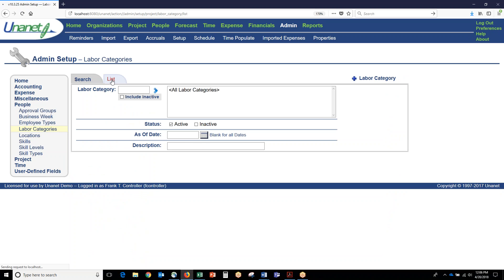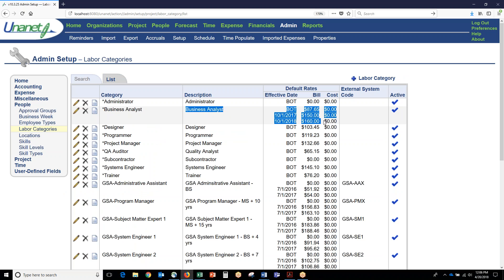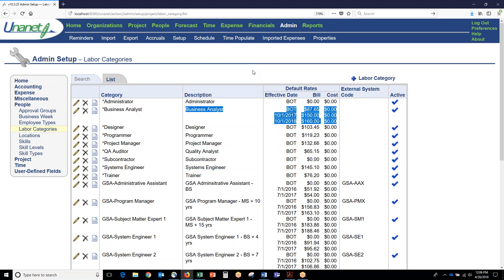You'll also set up labor categories. Labor categories are similar to skills but they're slightly different in that labor categories can have rates associated with them along with effective dates for rate escalation purposes. This is the list of master labor categories, and when we get into a project on the other side of the matrix, we'll see how we can have project labor categories that have rates associated with them as well, and how you can even override those rates depending on the project or the task.